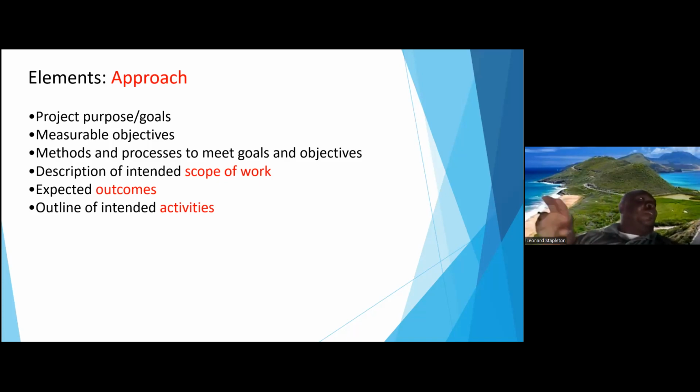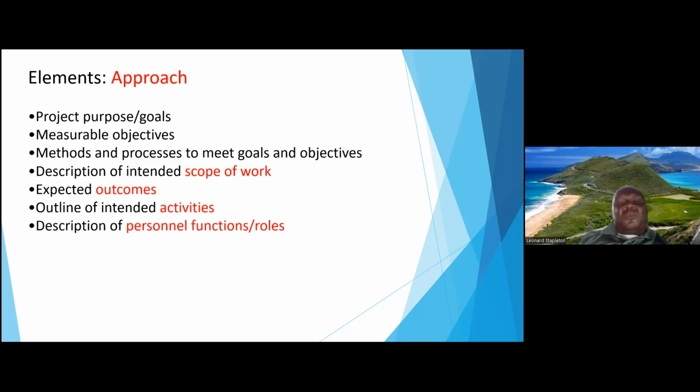So you can't just say you're going to do a workshop and not put down that one of the activities is going to be to actually secure a venue. Also, get the necessary equipment. All these are different things because all the activities would have a cost to them. That is why you have to be careful to look at what you're doing and the different activities you have to do to get the objectives, and then put a cost to each one.